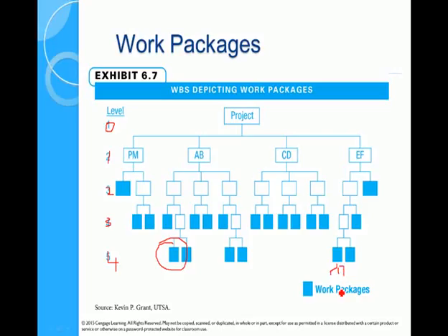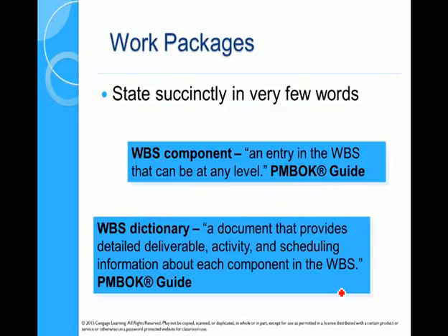Okay, so there's no rule for what level a work package needs to be on. I know some organisations say you must have it on level 3 or whatever it is. It's when you've decided that there's enough information for the person that needs to do the work to do the work, and there's enough visibility on the project. We'll get to that towards the end of the lecture.